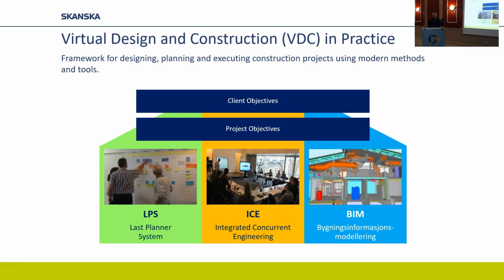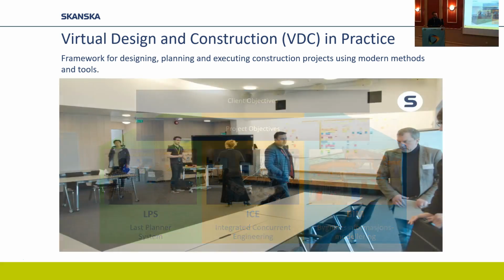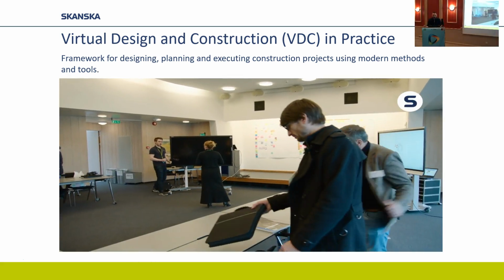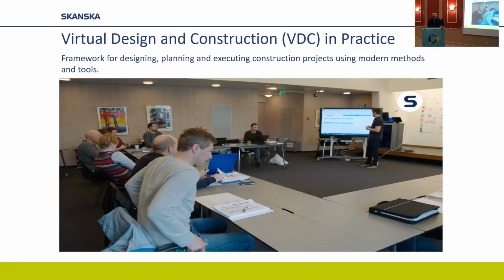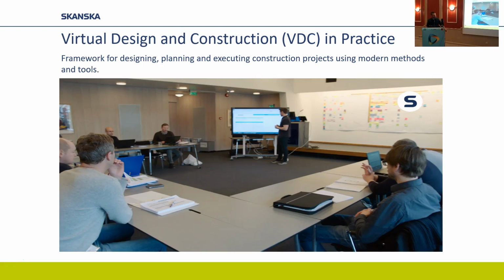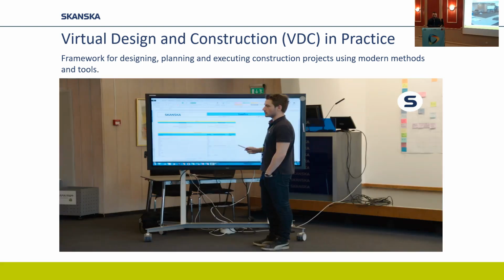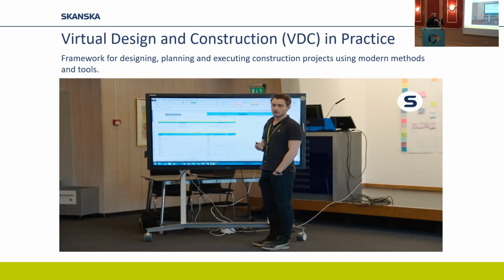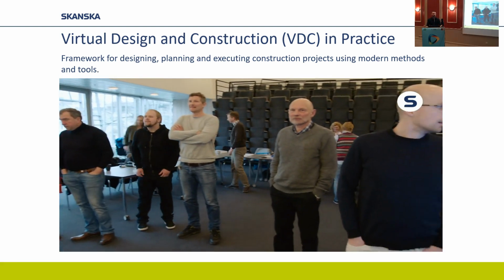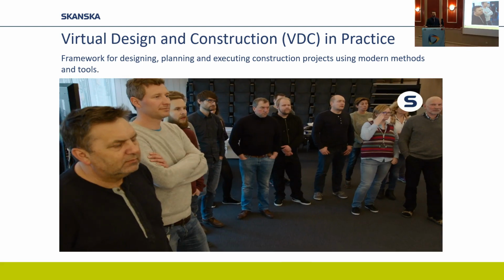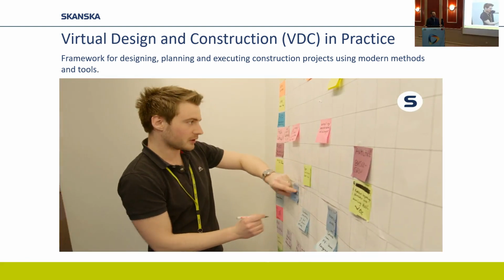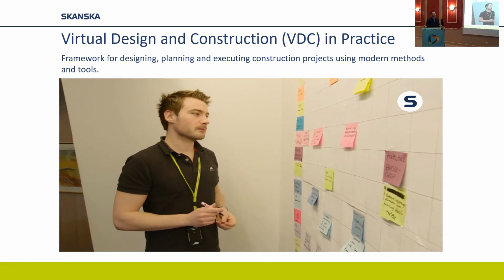So if you're interested in location-based scheduling or something like that, I would say that belongs within the last planner box. The best way of illustrating in practice what we do, I think, is the ICE sessions, probably the best visible way of seeing lean and BIM synergies. This is a typical ICE session. We bring the stakeholders together for the project. This is a design-focused meeting. So it's a design meeting, you'd say. Clients, architects, engineers, people from the contractor.